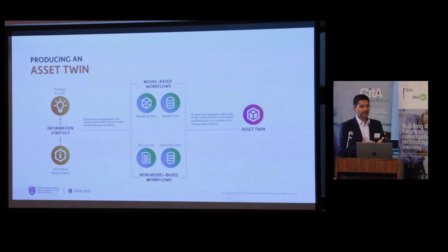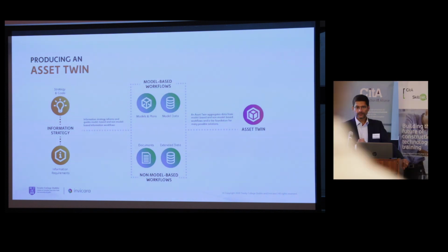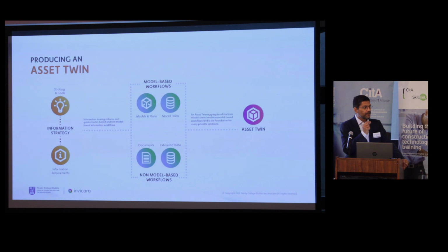Now, can you imagine what it costs to produce this information? And how is this going to be ever meaningfully used? And that apart, the project is not complete, it's still in early construction. It takes about 45 minutes for that model to open in a supersized desktop. Supersized, because every piece of data that we add into a model creates an additional overhead in terms of compute power required to process that model.